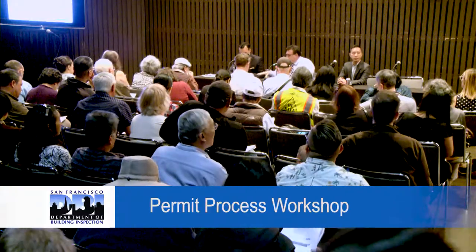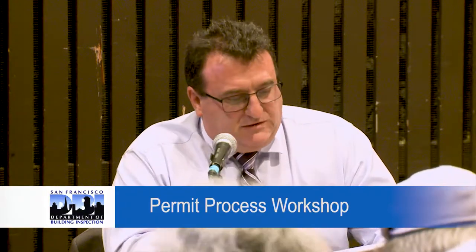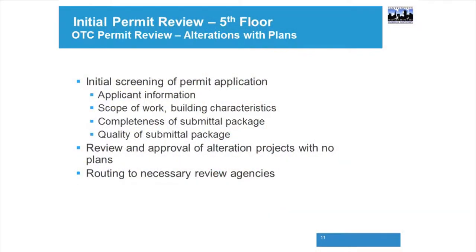Today, we've gone through a bit of information, and I'm going to take over at this point with the over-the-counter review process. When you start your over-the-counter review process, your first stop after the first floor is the information desk, where you will be provided a permit application, and they will give you some cursory information regarding your building. You'll go up to the fifth floor. On the fifth floor, you'll go through what's called initial plan review, okay?